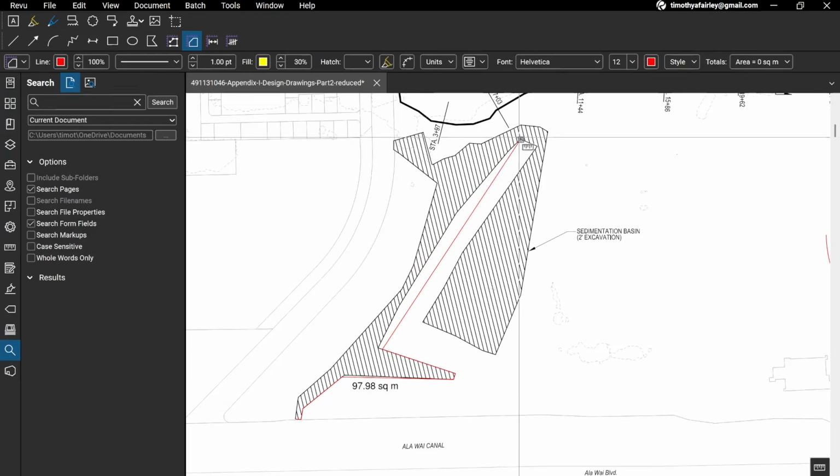If you don't know your quantities, you don't know your project. Every construction project can be expressed as a series of quantities. That's meters of pipe, cubic meters of concrete, or linear meters of cable. Everything downstream that we actually care about falls out of these quantities.